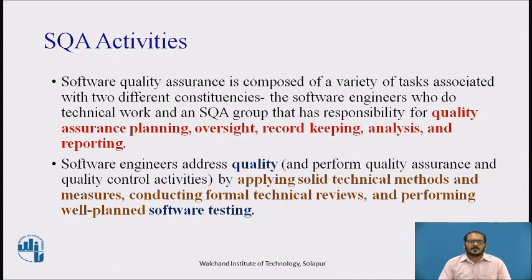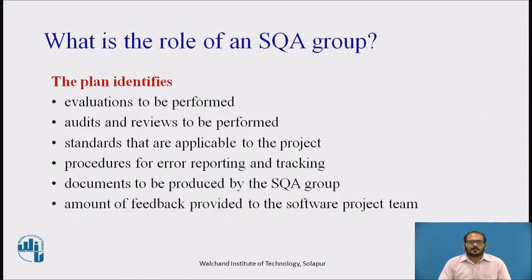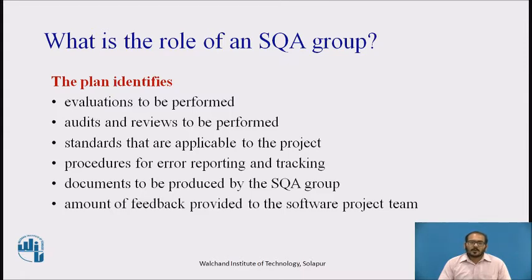These activities are performed by an independent software quality assurance group. The SQA group prepares an SQA plan for a project, developed during project planning and reviewed by all interested parties. Quality assurance activities performed by both the software engineering team and the SQA group are governed by this plan, which identifies evaluations to be performed, audits and reviews to be conducted, applicable standards, procedures for error reporting and tracking, documents to be produced by the SQA group, and feedback provided to the project team.